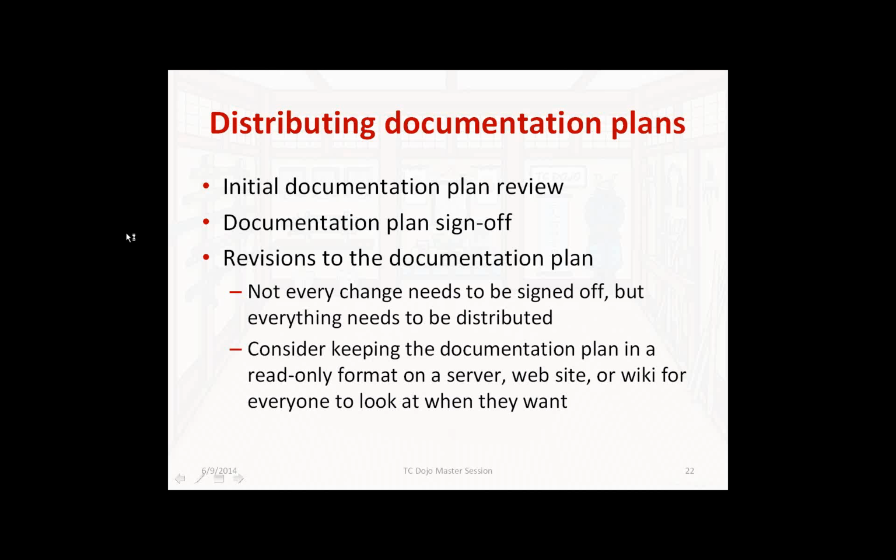You will then run around and revise this as necessary, and you don't need to sign off on every single change. You know, if you've updated the outline, they don't need to re-sign off. But you do need to distribute that. So if you have a significant change to the outline, you might release it on email and say, I have updated the outline in this section, and so on. The template has a change log, for example, and like that.